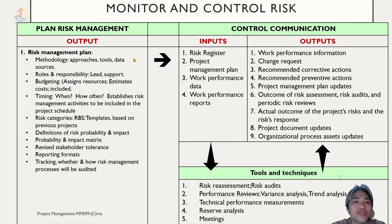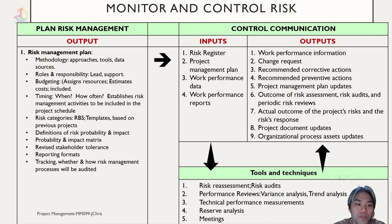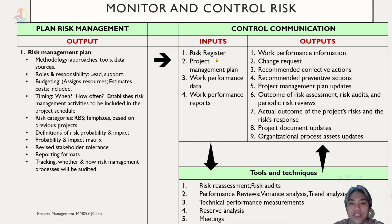Monitor and Control Risk takes its inputs from the output of plan risk management, which tells us the methodology, the approach to register the risk, who is responsible, the budget, timing, risk categories, definitions, and so on. These become the inputs along with risk registers, the project management plan, work performance data, and work performance reports.